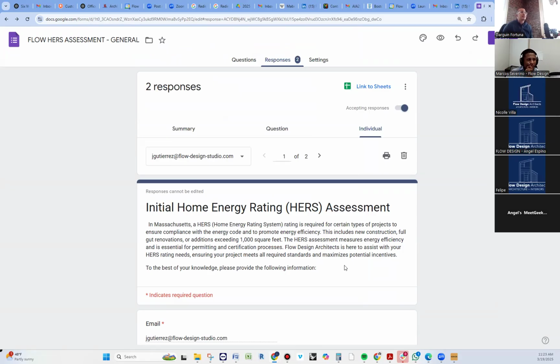I mentioned to you, schematic design, 23 Peter Solaris Road. I'm just making up that name. Here's a report. I'm going to be sending you shortly the permit set after so that they can set it up on the queue. Time is of the essence, guys. It takes about 3 days to get a return projected HERS rating. So you don't want to be messing around with that. It takes some time to get that.